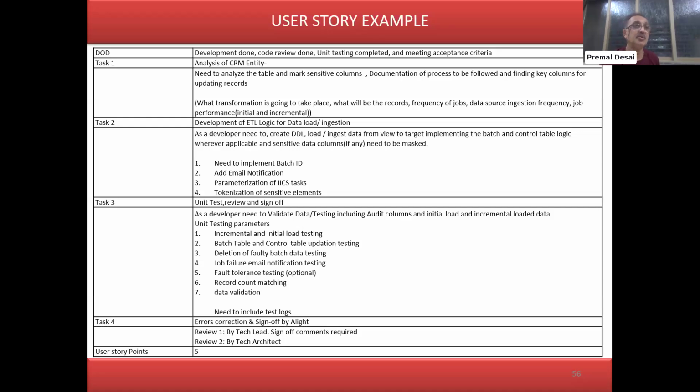Every user story usually, underline the word usually, will equate to 6 hours of work. 2 hours are discounted, subtracted, because of email exchanges, collaboration, daily meetings, other contingency, unplanned work, and so forth.